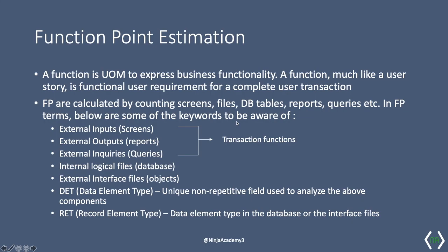Let's begin by defining what a function is. A function is a unit of measure to express business functionality. Much like a user story, a function is a functional user requirement for a complete user transaction. In function point, the function points are calculated by counting screens, files, database tables, reports, queries, and so forth. And there are certain keywords that you need to be aware of when it comes to function point estimation.